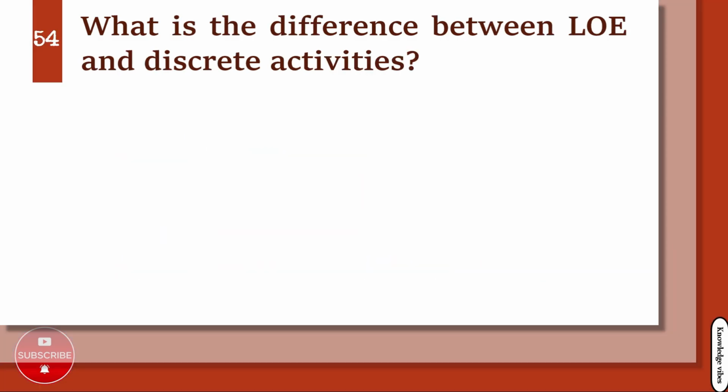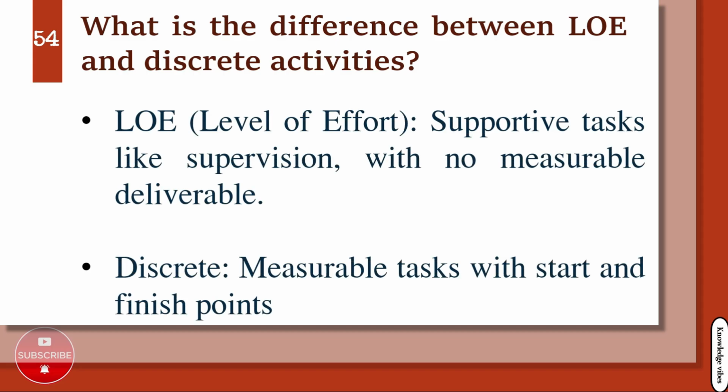What is the difference between LOE and discrete activities? LOE, level of effort supportive tasks like supervision, with no measurable deliverable. Discrete, measurable tasks with start and finish points.